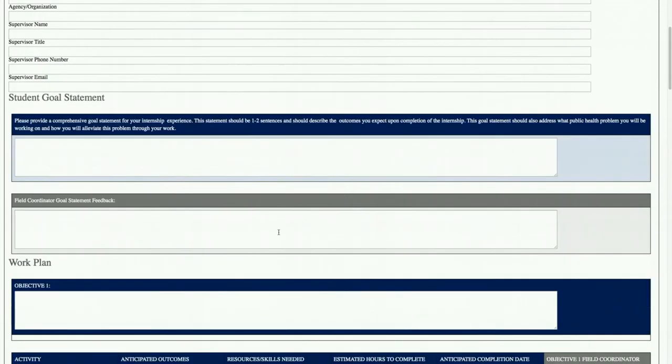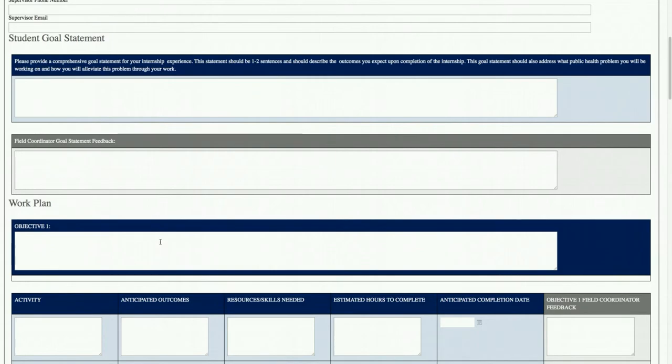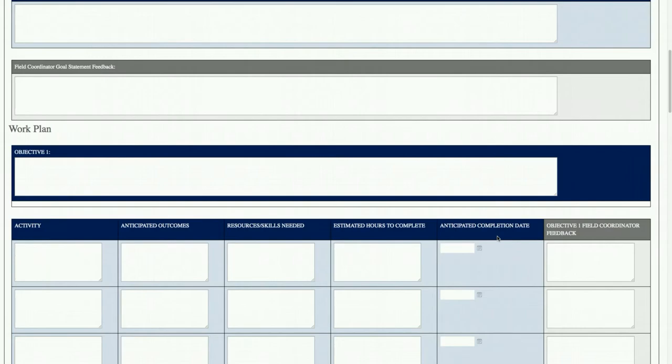You'll also see a comment box where the field office will provide comments and tell them either they need to revise it or make suggestions. They have to fill out at least two objectives with associated activities, anticipated outcomes, resources, skills, estimated hours, and anticipated completion date. If you want to work on this with your student, fantastic. It's not required, but you should go in here and double check that they are doing what you discussed. Students don't always understand your business and what you're trying to accomplish.